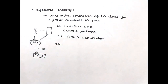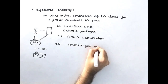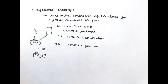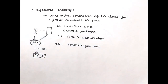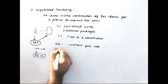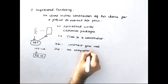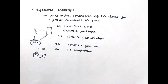The advantage of negotiated tendering is that the contract generally goes well because the client already has a past relationship and good experience with the contracting agency. There are fewer arbitrations and conflicts between the contractor and client. The disadvantage is that there is no competition, so the price can be unusually high, since only one company is bidding.